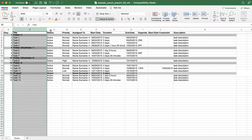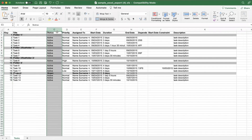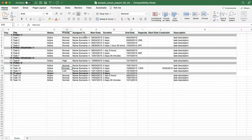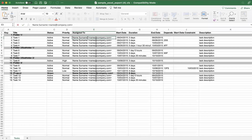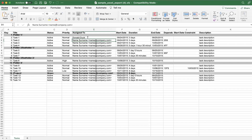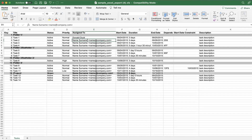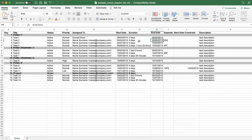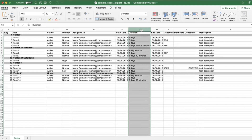Status goes here in column C. The rest of the columns are pretty intuitive. I usually leave priority alone. Assignee goes into the assignee name — you can technically use email or the actual name as long as that user has a name in their account. If Donald Duck is in the account, a separate window will pop up during import saying 'we think we found Donald Duck — is it this person?' and let you map them over. Whether you use email or their actual name, we can map in the assignee. Start date and end date follow, and duration is technically calculated off those.